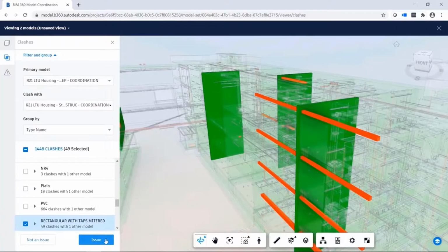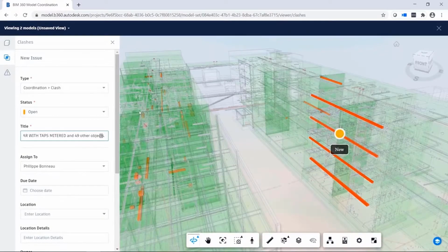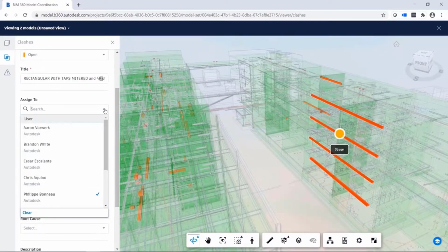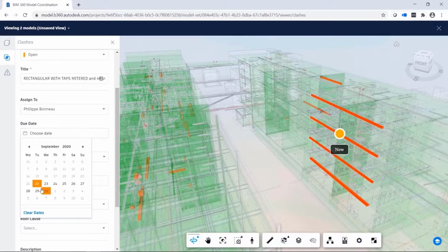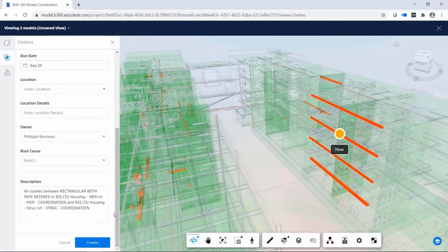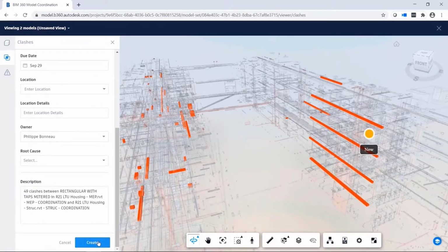I view Navisworks as a program that allows me to bring different model files together into one, and it allows me to do a clash of various models against one another to see what geometries are overlapping so I can figure out what to move, where to move it, and how to move it. In construction, I use Navisworks every day to check coordination between various parties to make sure there are no clashes so that we're good to go when we're building it out on a job site.